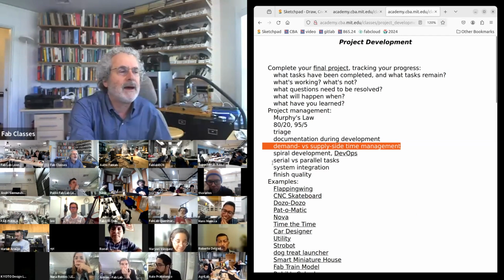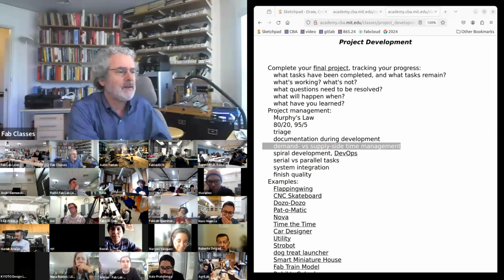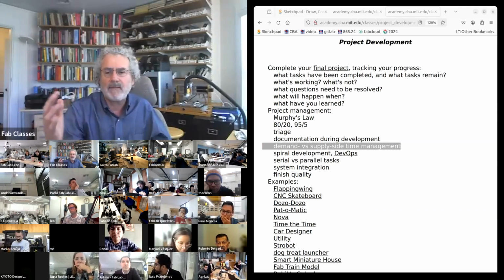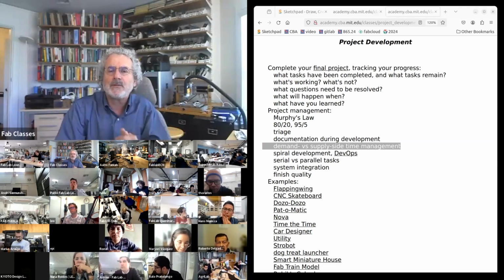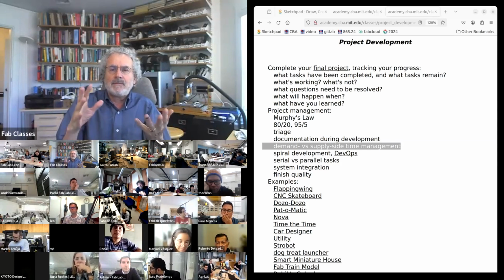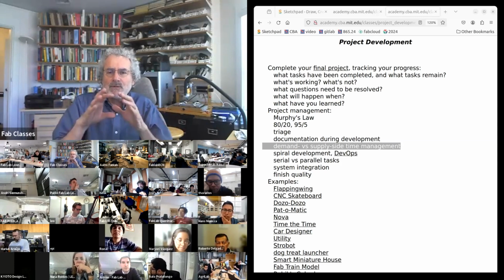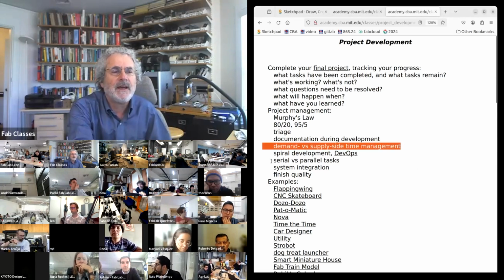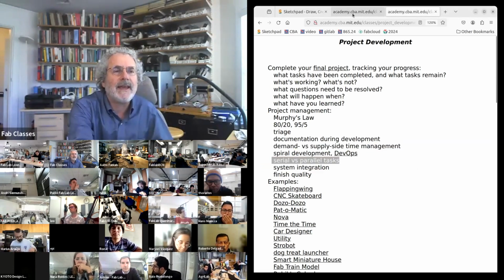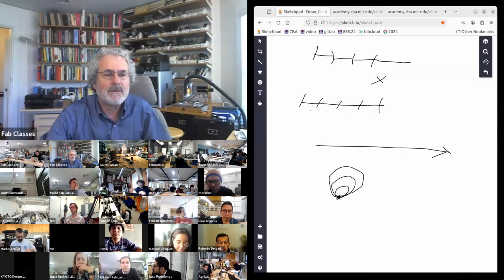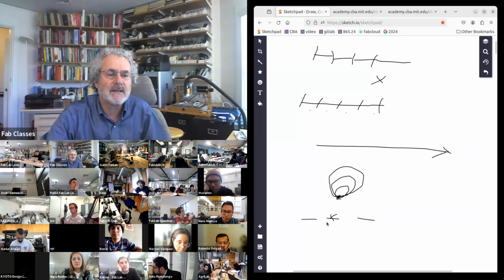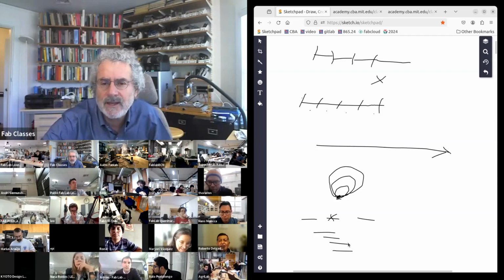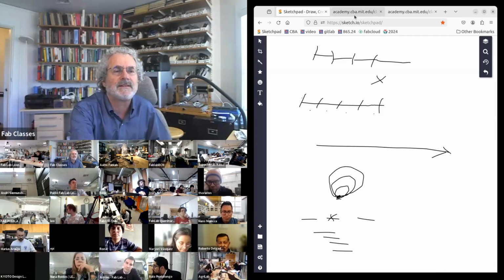Think about modularity. If you make all your hardware as one monolithic unit, all your software as one monolithic unit, you can run out of time, it can fail. Try to decompose into modular systems you can debug and test separately. If you go back to Gantt charts, don't do task, task, task, because any one task failing can block all the other tasks. Think in terms of working in parallel to keep all of your tasks moving.